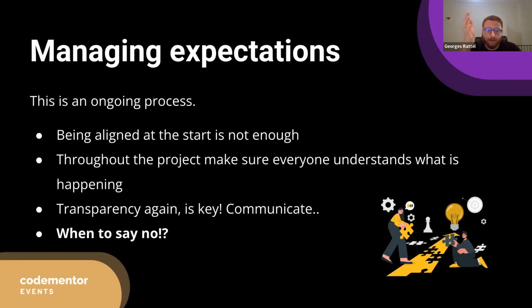And if this delay wasn't communicated clearly and the client wasn't really made aware of that, you're going to end up with a conflict, and the client might have other commitments that are also dependent on the release of the project, for example, marketing or whatever it is, and they will have damages. And regardless of how many features you've added to make them happy, they will end up feeling annoyed and let down.